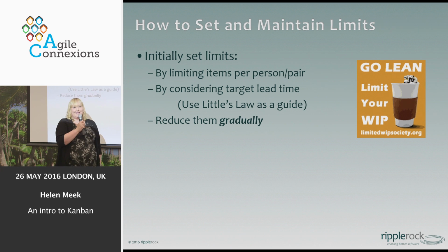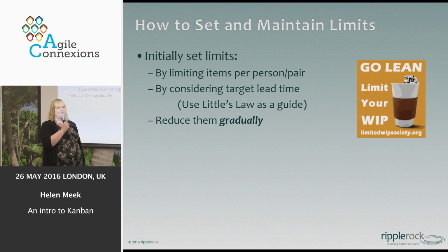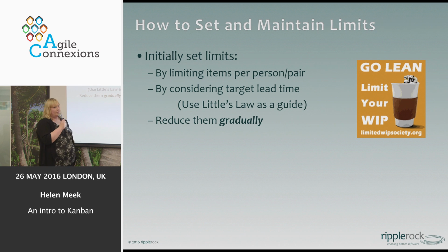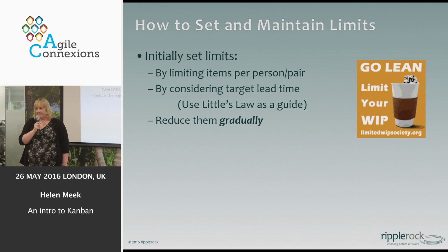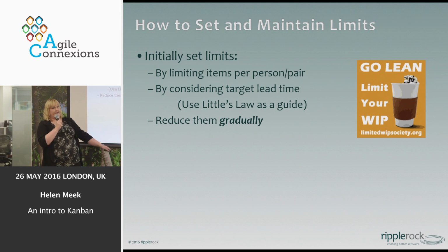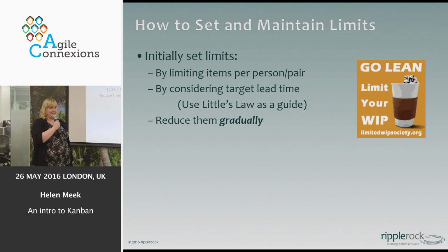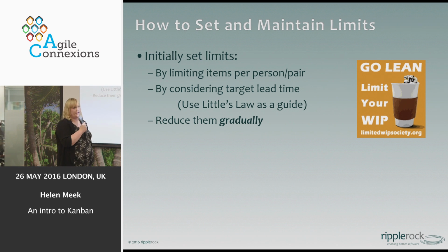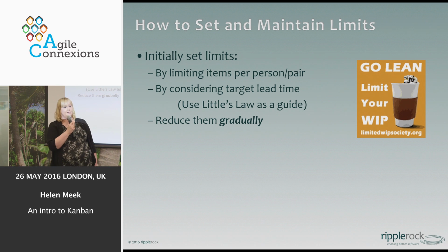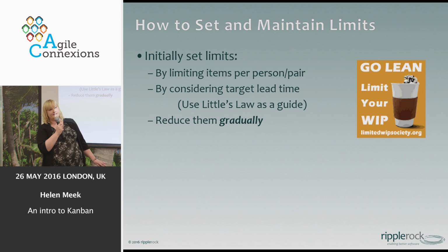Now, there's a few exceptions, because there's exceptions with everything in life, and that is when I'm working with application support teams, you find out that they're probably working on lots and lots of tickets at the same time. So I have been known to increase WIP limits for application support to between 5 and 7.